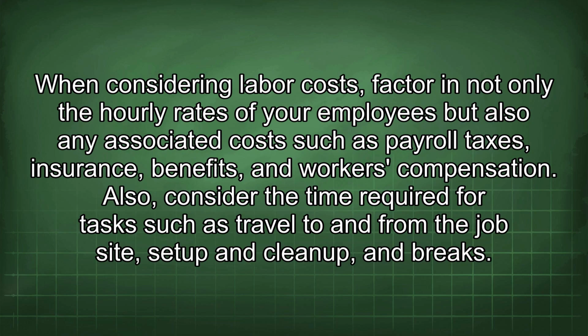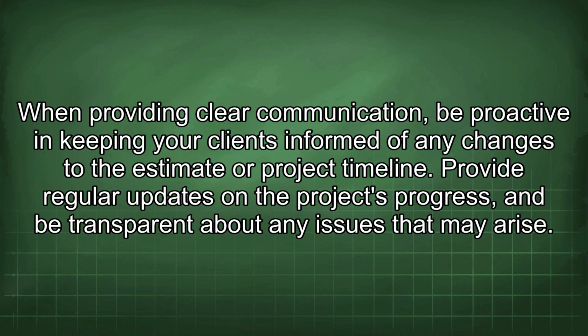When considering labor costs, factor in not only the hourly rates of your employees but also any associated costs such as payroll, taxes, insurance, benefits, and workers' compensation. Also, consider the time required for tasks such as travel to and from the job site, setup and cleanup, and breaks.